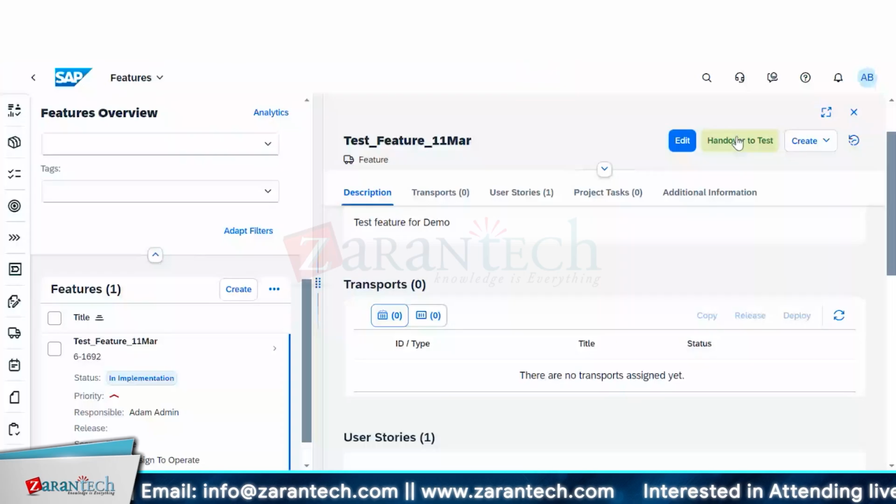because the authorization or the access is role based. If you have a change manager role, you can approve or not. For example, Adam is limited, he's a consultant. I have been given the role of Adam, the consultant one, and you, for example, are the manager and have been given the role of Agatha, the manager role. So when I create a TR here, like we have done now, I will not have the authority to do the approvals. I'll come back to you, I'll just mail you or ping you. Then you will come to the feature and do the approval. You got my point?